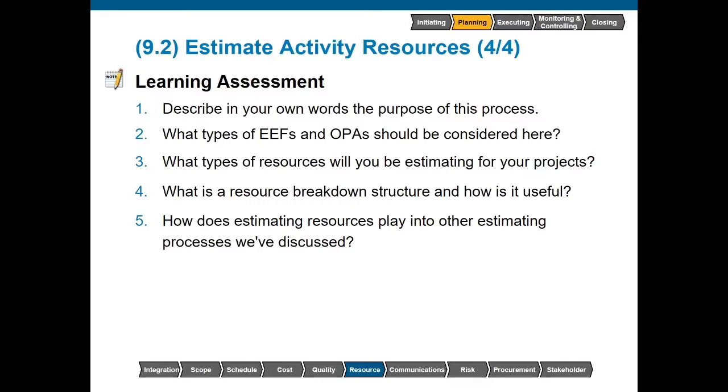How does estimating resources play into other estimating processes we've discussed? This is going to work directly with estimate activity durations and also estimate costs. And the three of these processes will kind of go back and forth until we find an answer that satisfies all of our constraints.